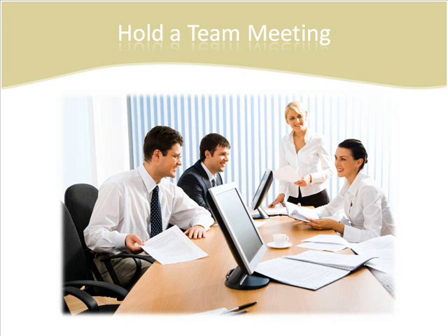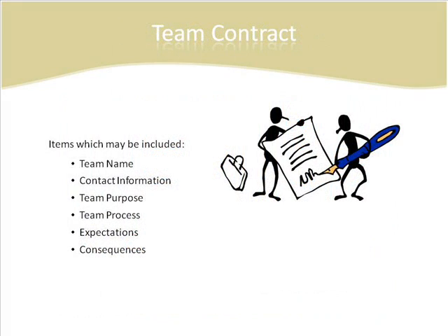Now on to the team contract. This is a set of guidelines that project team members each agree to live by during the term of the project. It includes team meeting ground rules, meeting guidelines and procedures, and any other guidelines that team members want to use in handling meetings, conflicts, and decisions. The group members must communicate and negotiate effectively to identify standards for mutually acceptable quality of work and comfortable levels of group participation and individual accountability.